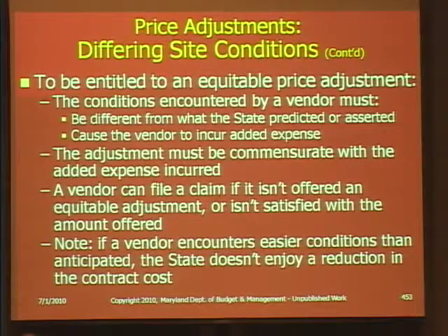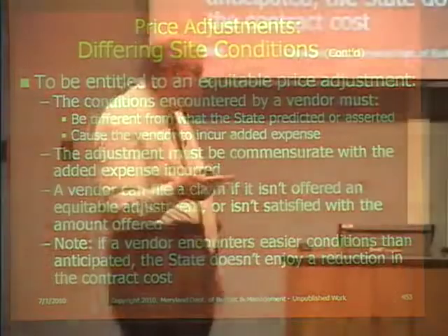Note, if a vendor encounters easier conditions than anticipated, the state does not enjoy a reduction in the contract cost under this differing site condition clause. It's one-sided, only for a vendor to get more money.